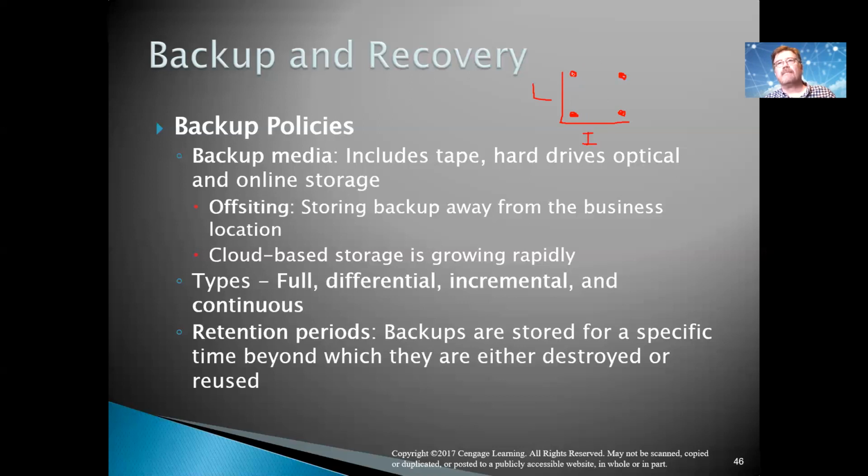But here's what I'm trying to say. If it's likely that it's going to happen, and it's got a huge impact if it does happen, those kinds of risks are going to have pretty significant mitigation plans, right? People are going to be looking for those. Let's imagine, for example, you're trying to withdraw money, and it's likely that it's going to all of a sudden give you too much money. Pretty big impact, and they're going to be looking for ways to mitigate that risk.